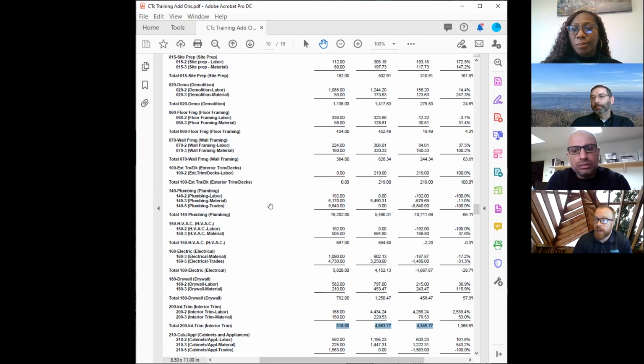So tracking our in-house labor is important. This particular tool is lagging. It's lagging between 1 day and 2 weeks, because that is the increment we're looking at every 2 weeks. We could get bills that came in up to 2 weeks ago and you wouldn't see it on the previous report, but then you'd see it on this one for the labor hours. And that's when we try to hit a schedule, because we build the schedules based on the estimates. As soon as we get derailed from the schedule, that's when we start getting overages on our in-house labor hours.